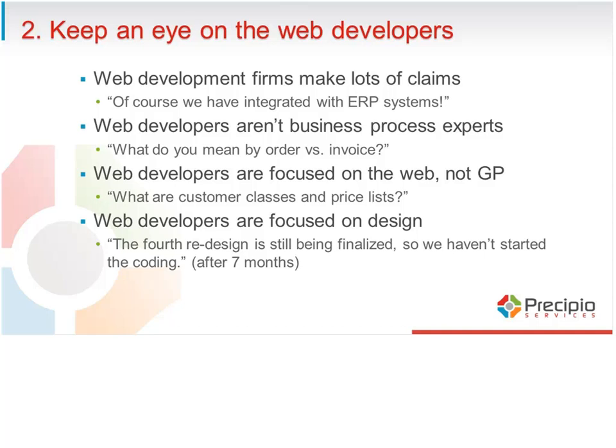And again, web developers are often focused on design. And so the design of a website, the look and feel, the customer experience, all of those elements will be their focus. And as a result, it can often push other functionality later in the process, which can really mess up project schedules. So I have a client on their 4th redesign of their website. I don't know why, but after 7 months, they still haven't started coding on the actual back-end and e-commerce and integration functionality. So that's one of the challenges of a complex or a custom web development. Many of the design elements get priority, and all the back-end work gets pushed to the very end.